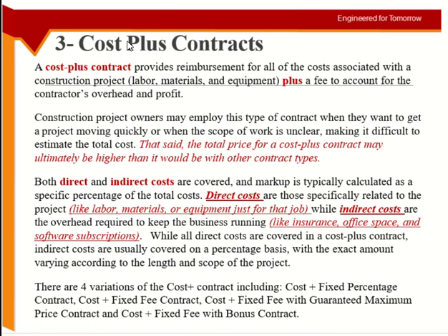But your business is attached to the project, right? So the project has to carry your business as well. It could be logistics, it could be fuel for your equipment, the generator you are running on the site. You may have to buy tankers of water for the labor and so on. So this is all overhead. Your office rent, your software subscription, ChatGPT subscription, right? All this is overhead, modern overheads. All this is considered part of cost.